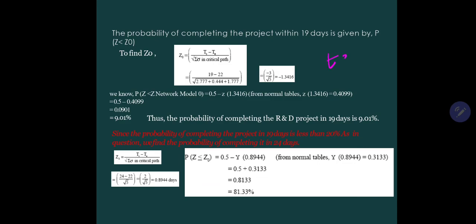As T is given 22 days, we took 19, we cannot do this. For another example, we will take 24 days, two days forward. For 24 days, we will calculate, following the same procedure: 24 minus 22 divided by under root of 5, so 0.8944 days. From the normal table, we calculate this value. 0.5 plus this equals 81.33 percent. The completion of project in 24 days, the probability here is 81.33 percent, while in 19 days it was only 9 percent.